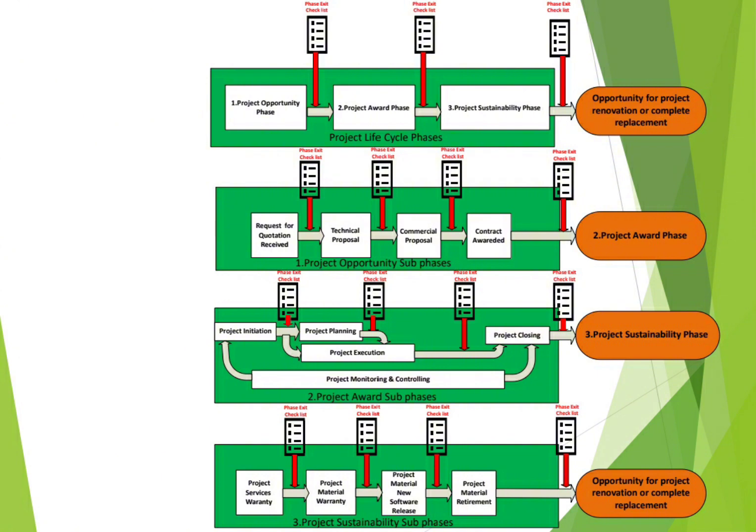So your team will start working hard in the design phase, securing the approvals of the design documentation, submitting any milestone invoices, after that proceeding with the material procurement based on the approvals, after that proceeding with the manufacturing, factory acceptance testing, delivery, and invoicing also if there is a delivery milestone invoice to be submitted.